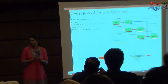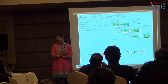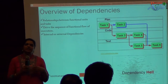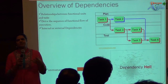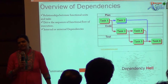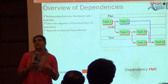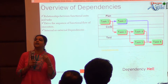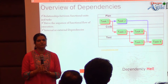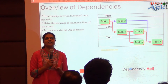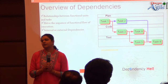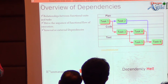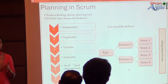We all know what dependencies are — they are basically relationships between functional units. In regular project management we might have seen start-to-start, start-to-end, and so on. Especially in Agile, if you don't handle them, you will ultimately end up making it a Scrum-fall or a waterfall. If you don't handle dependencies, it becomes a dependency hell.